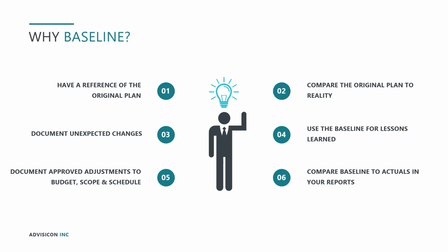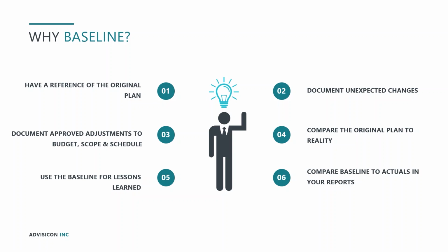So why take the time to baseline your schedule? First off, it gives you a reference to the original plan. When you baseline and you then choose to make updates and changes and progress your schedule, if you're utilizing the auto-scheduling function that comes with Project, any changes that come to the schedule that might not have been originally anticipated are then auto-calculated and adjusted in your schedule. So then what you can do is take your current schedule that has been progressed and compare it to the baseline. This gives you a reference and the ability to look and see if changes have happened where you may not have noticed them otherwise.